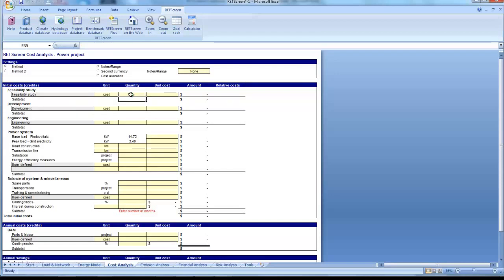Once a potential cost-effective proposed case project has been identified through the RETScreen pre-feasibility analysis, a more detailed feasibility study is often required. While medium and large-scale projects will often call for detailed feasibility studies, small-scale projects, such as the one we are considering, rarely merit the level of detailed analysis typical of such studies. Occasionally, very small projects may warrant feasibility studies, but this project is believed to be fairly straightforward in terms of the parameters. Likely, related feasibility activities would be handled in-house by the select system installer. Thus, we will not allocate any costs for a feasibility study for this project.